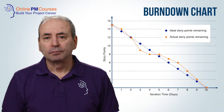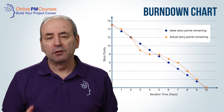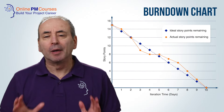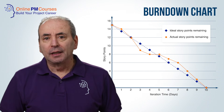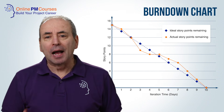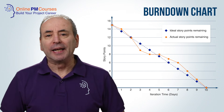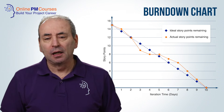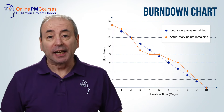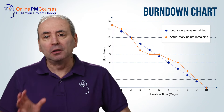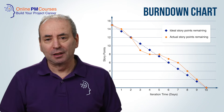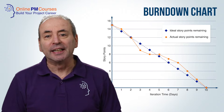Let's start with the burndown chart. On a burndown chart, as you make progress and work is completed, the amount of work remaining diminishes, which gives us the characteristic downward slope of the burndown chart — which gives it its name.